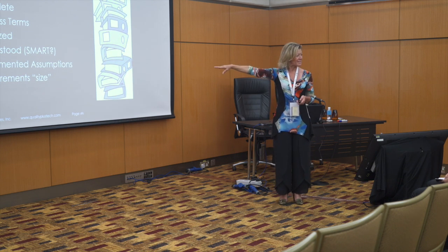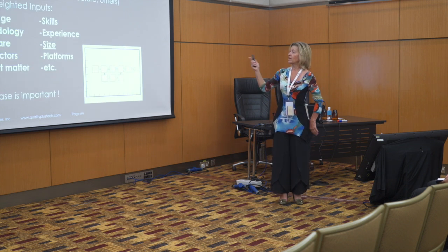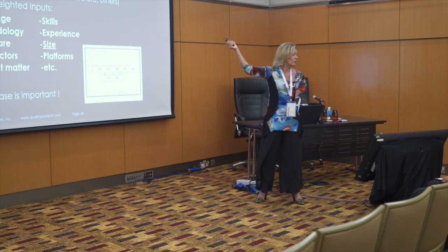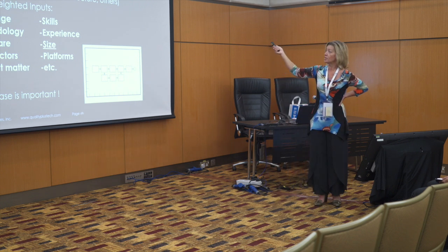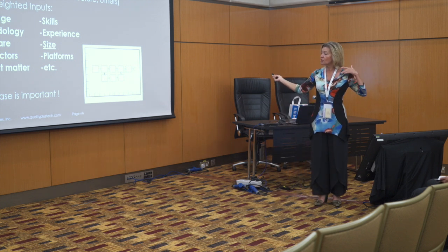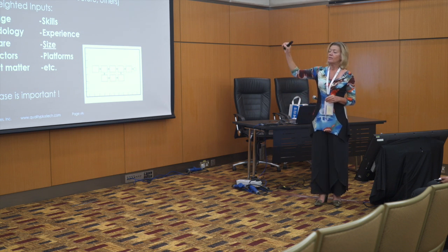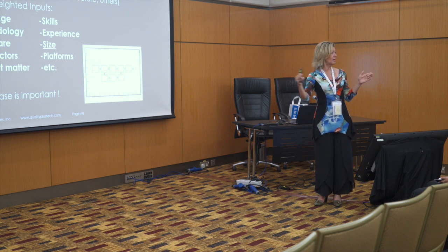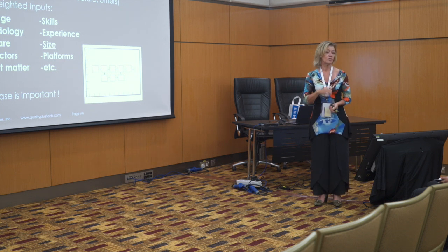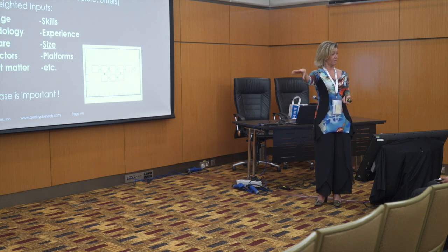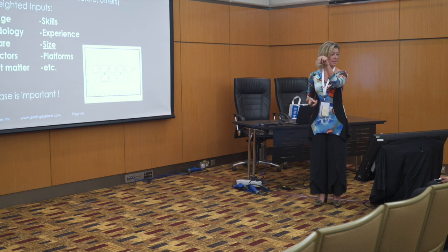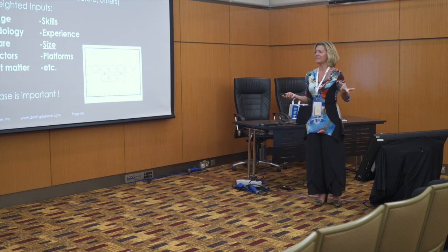And what about the requirement size? Does that make a difference? Well, when we get into estimation, what are our challenges? Well, we've got multiple models, depending on whether you've got hardware involved in a project, whether you've got software, whether there's infrastructure, all the different types of projects. We've got complex weighted inputs, because in parametric estimating, it is not a linear association between size and effort. It would be nice if I could say size times a magic number equals effort. That would be great, but it doesn't happen that way.